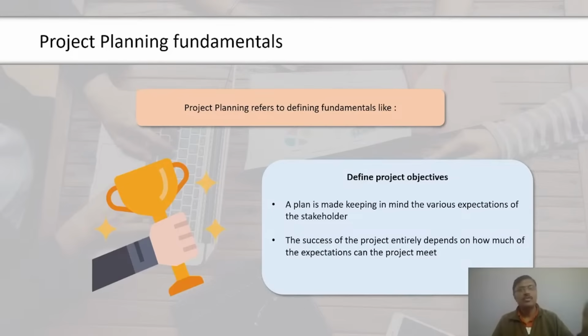There is no question asked on variance, but the formula is important because if the standard deviation of the whole project is to be calculated, the process is to calculate the variance of the whole project and then take its square root to calculate the standard deviation of the project. Concept-based questions on PERT can be expected in the PMP exam, so make a note of the formula while you prepare for the exam. In the next screen, let us understand PERT with an example.